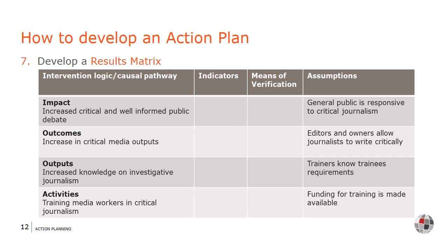Assumptions should be monitored on a regular basis as circumstances within and outside the action plan context might change. If our assumptions prove to be wrong, we will have to adjust the intervention logic. For instance, even if the trainers are well aware of the trainees' requirements, then, if suddenly the trainers are replaced, this assumption might no longer hold good.